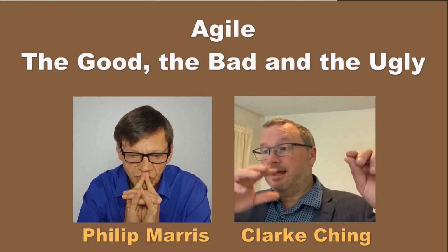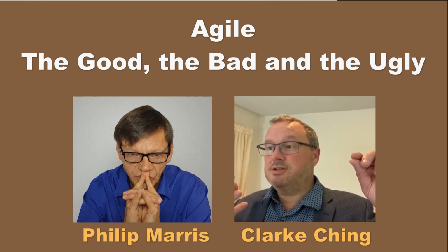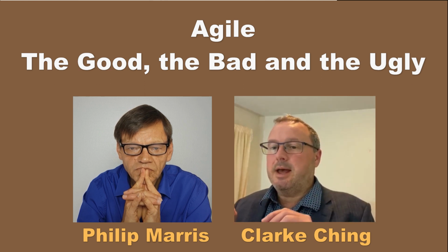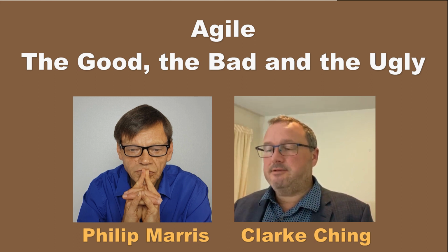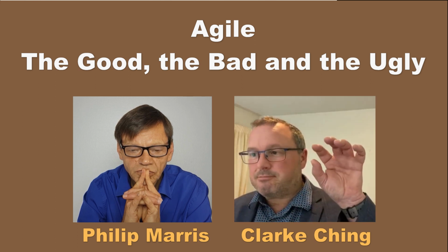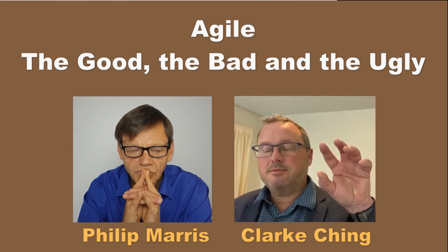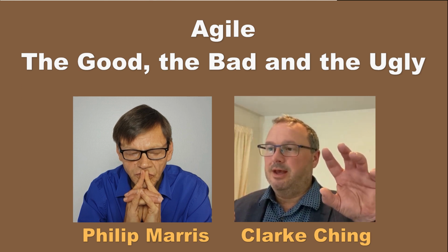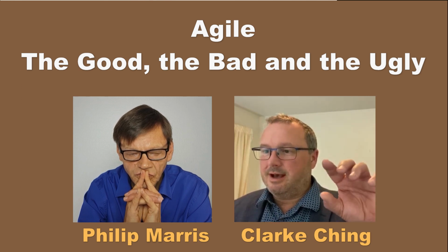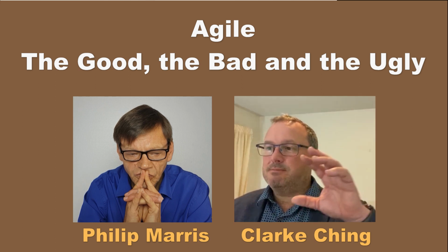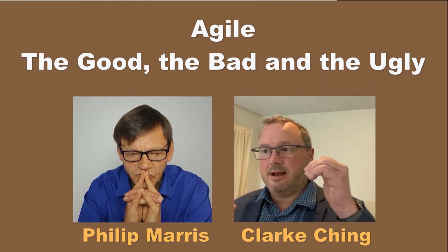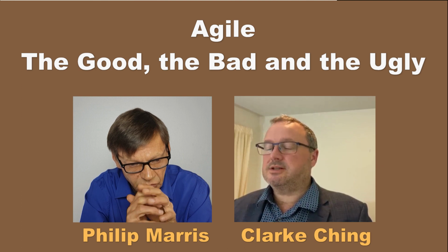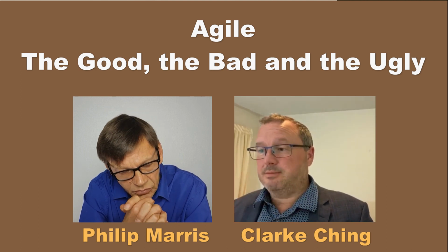You need to collaborate with them so that you can take them solutions maybe and suggestions rather than just problems. You need to fundamentally make it easy for them to find a little bit of extra time. And because they're probably the genuine bottleneck, getting them 20% time has an enormous positive effect for the whole team. So a tiny improvement gets a big result in terms of the value of stuff that's being worked on and the amount of unnecessary rework that's been caused. So just get them a little bit of extra time, and then get them a little bit more time.